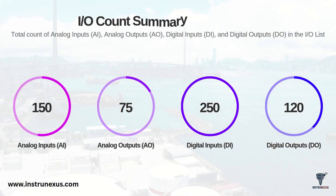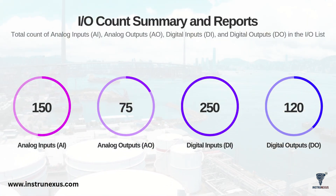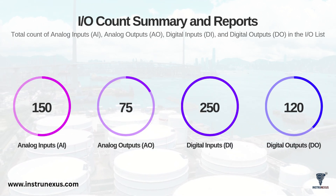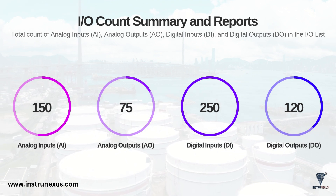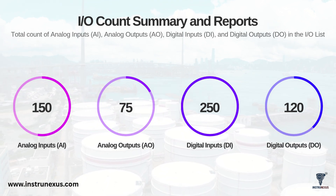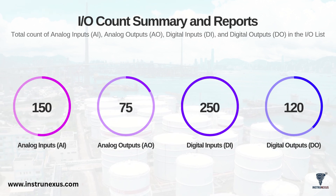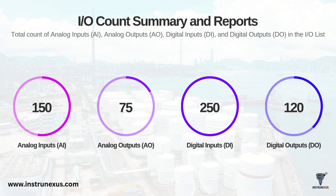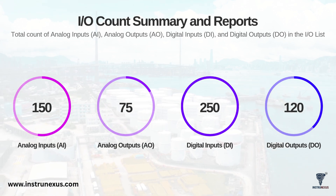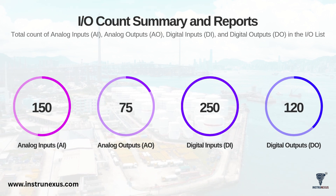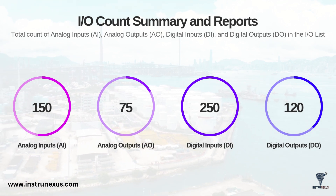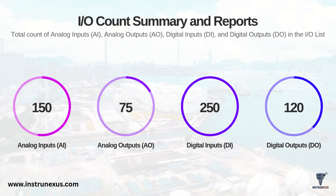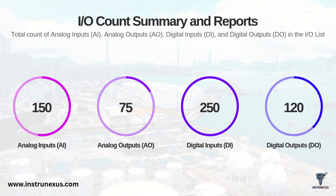One of the most important outputs of the IO List is the IO count summary. This is a high-level report showing the total count of each IO type – analog inputs, analog outputs, digital inputs and digital outputs. This summary – like the example shown here with 150 AIs and 250 DIs – is the primary input for hardware design and procurement. It tells the automation vendor exactly how many IO cards to purchase, how many DCS cabinets will be required, and how large the control system footprint will be. This summary is constantly tracked throughout the project as it directly impacts project cost and hardware engineering.